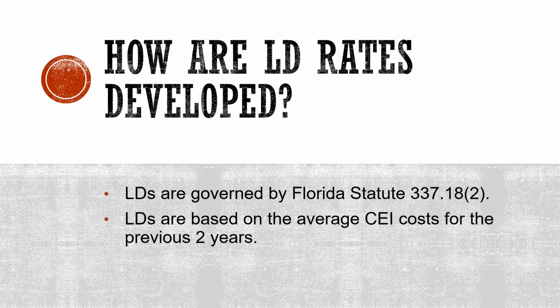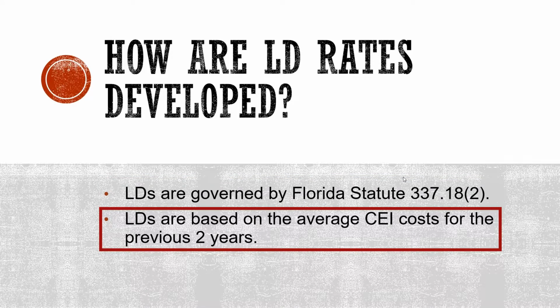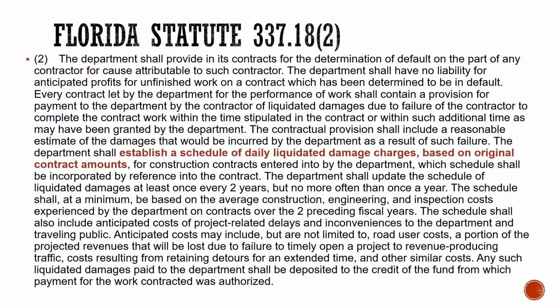How are liquidated damages developed? Like I said, they're governed by the Florida statute, and the Florida statute states that they'll be based on the average CEI cost for the previous 2 years. These next slides are the language of the Florida statute. I won't be reading them to you. You can read them if you'd like, but I will point out a few of the important pieces of it.